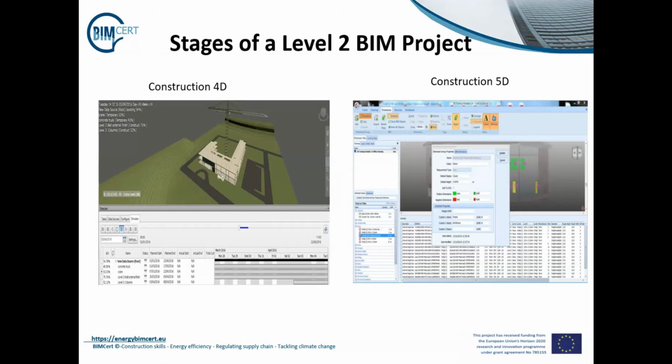BIM technology has now been extended throughout the whole construction process, so as to guide the construction and make efficient design analysis, such as constructability reviews, programming, materials management, site logistics, amongst others. Where 4D technology has been embraced, direct savings and an increase in productivity have been seen. The use of 4D enables considerable savings to be made on construction projects by identifying problems prior to construction and avoiding rework during the project.